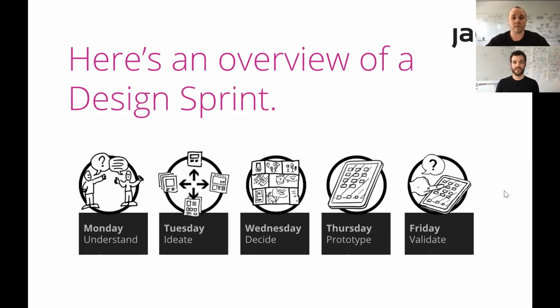Over to you, Christian. So design sprint is essentially a framework that's a rigid time-boxed model to help your team to move from an idea to a tested prototype. And it's quite important because you're working with a team to move forward, not get stuck. We appoint a decision maker before the design sprint. And that's crucial because throughout the design sprint week, you have points where we have to make decisions to move forward. So decision maker is quite important here.